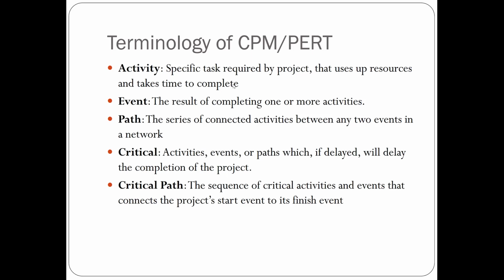And if you further divide that research into different categories, the task that you need to complete in each category will be an activity. So depending on how big and how complex your project is and how detailed your work breakdown structure is, that activity can be at different levels, but they all require resources and take time to complete.